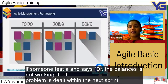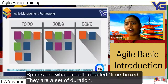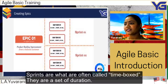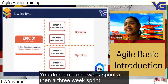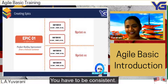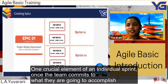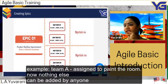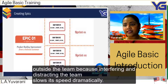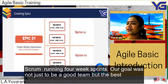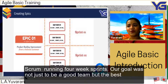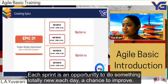Sprints are called time boxes — they have a set duration, and you must be consistent. You don't do a one-week sprint and then a three-week sprint. One crucial element: once the team commits to what they will accomplish that week, the tasks are locked in. Nothing can be added by anyone outside the team, because interfering and distracting the team dramatically slows its speed. Our goal was not just to be a good team but the best. Each sprint is an opportunity to do something totally new; each day is a chance to improve.